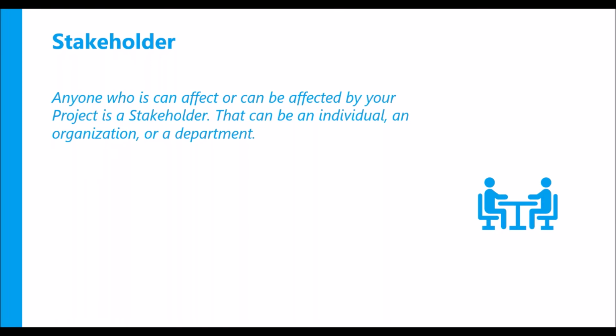So the principle says that you need to effectively engage stakeholders. What do you need to do? The first step is to identify stakeholders, internal within the team and external to the team. And you typically do it in the initiation stage of the project. The earlier you identify stakeholders, the less risky your project would be. Secondly, you need to engage stakeholders. You need to understand their expectations in the project so that you can document them early and include them in your requirements. You need to analyze their influence as well.